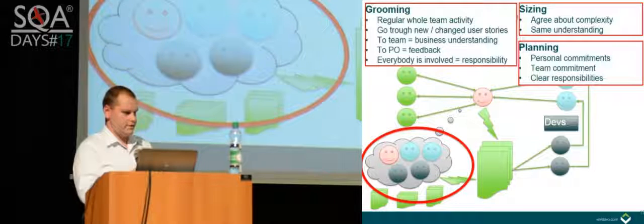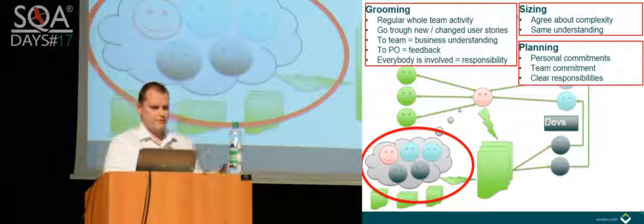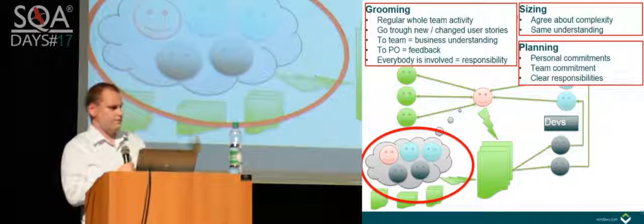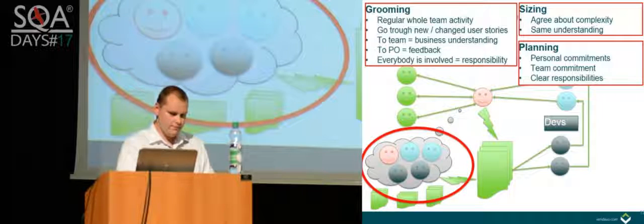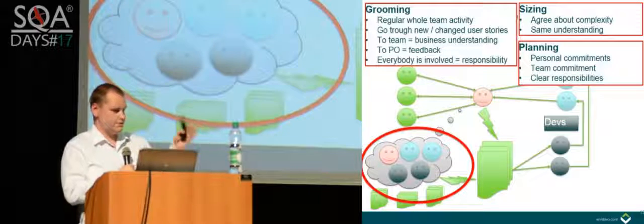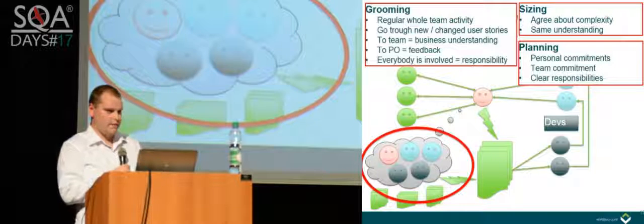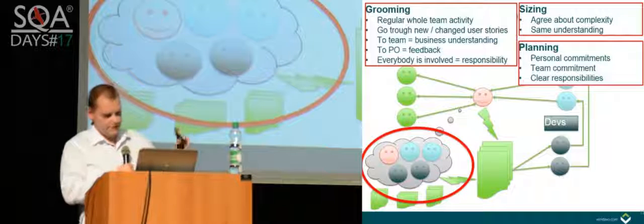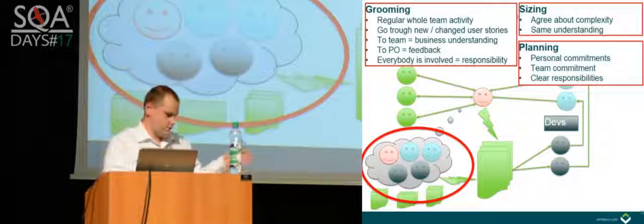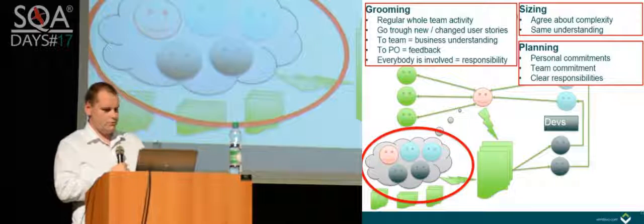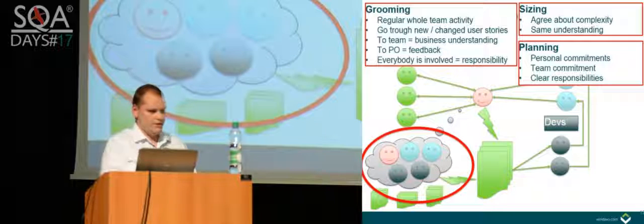And then another consequence of that is that we overestimate. Basically we say some guess, like 8 hours, 16 hours, typically a multiple of 8 hours, and we add a significant buffer so as not to be losers again because we underestimated. But then it has no point, so sooner or later you should find a formula which works for you. I always use the formula optimistic plus realistic plus pessimistic, divided by 3. Estimating takes more time, but I need to consider all possibilities: if everything goes well, then theoretically it's 4 hours. Realistically, based on this project, this experience, this team, it should take like 10 hours, and if things go wrong, then you think about all the possible scenarios that could happen, then it's 20 hours. Then you divide the sum by 3, and you have an estimate which on average will work for you.